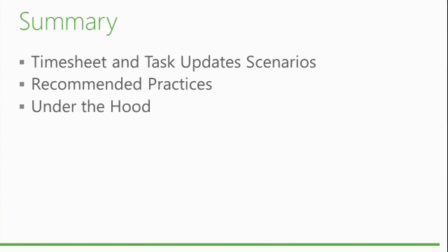For looking at timesheet status across a period, it appears that if someone has not created their timesheet, there's nothing there to get the status. You have to look by the absence of it. Yes, you will have to do another join to be able to show that. But you can do that, yes. It's true, this table will only show what has been created for the timesheet if you do the timesheet compliance. Otherwise, it won't show up if it's not created.